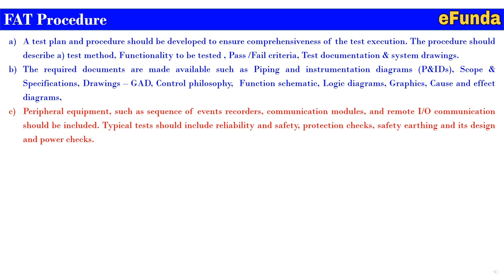Peripheral equipment such as sequence of event recorders, communication modules and I/O remote communication should be included. Mainly, the hardware manufacturer conducts a functional test of the equipment in accordance with quality procedures or the control plan. Typically, tests should include reliability and safety, protection check, and safety interlock design and power check.